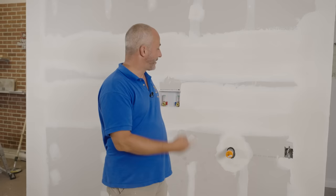It's raining again now. We're gonna call it a day. This is gonna be another hour or so before it's dry in the current conditions, and that takes it far too late. So we're gonna pick this up in the morning and we'll finish there. And it looks like I owe my son a round of golf because had it been nice and dry or a normal sunny day without the rain, I would have had no problem getting this done, all right? From the point that I start sanding and painting, this sucker's done in less than 2 hours. I'd have been out of here at 5:30 and I would have won the bet.